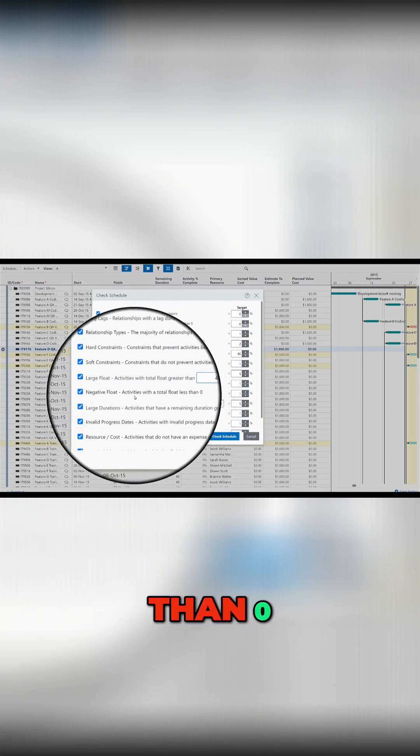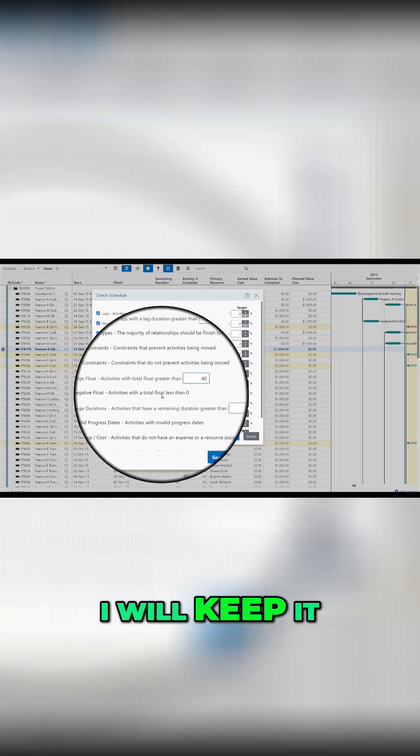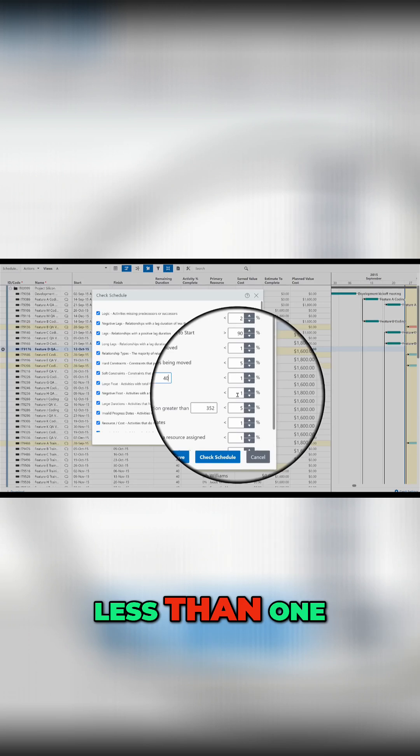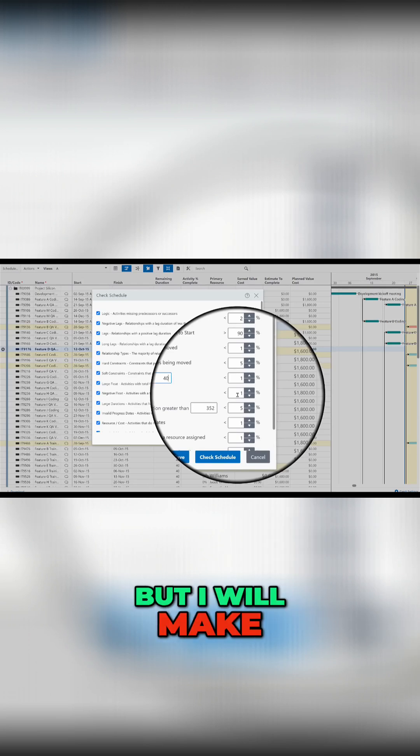Negative float activities with a total float less than 0, I will keep it less than 1 but I will make it even 0%.